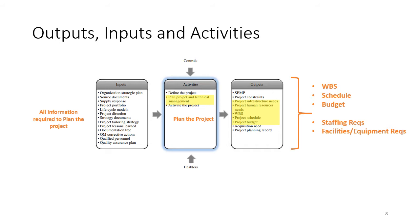In terms of outputs, you take all the information related to the project and planning for the project, and that generates the project plan. The primary outputs are a work breakdown structure (WBS), a schedule, and the budget. Associated with the schedule and budget are staffing requirements and facility and equipment requirements.